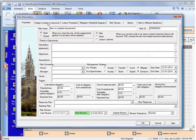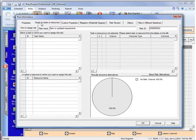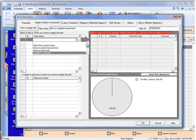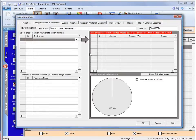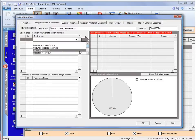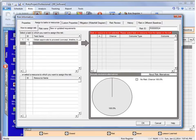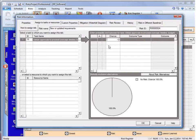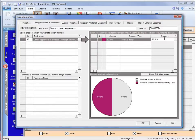And to assign it to an activity, we go to open up the risk and go to assigned to tasks or resources. And in this view, it will list all of the activities. I could type in the task ID. So we're just going to assign it to an arbitrary activity. What we have to do is give it a chance that it will occur, an outcome type or relative delay, and the outcome.